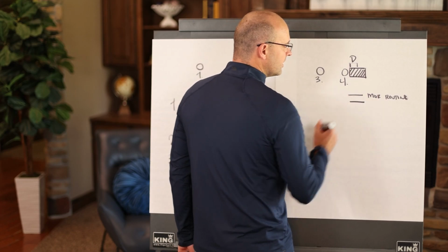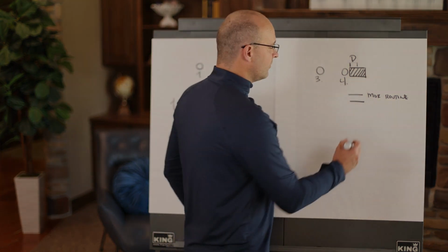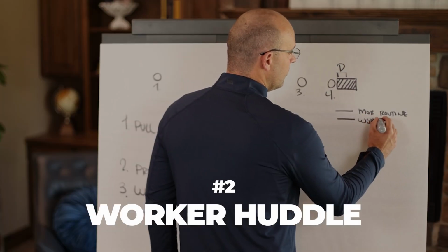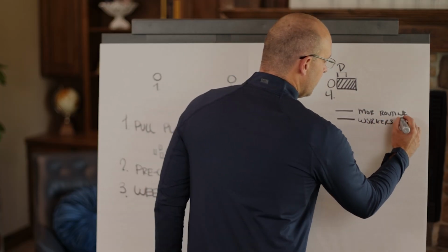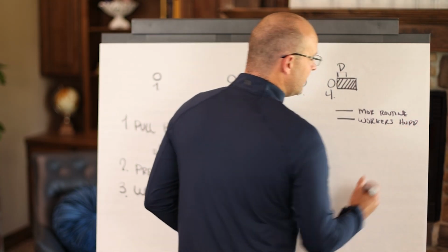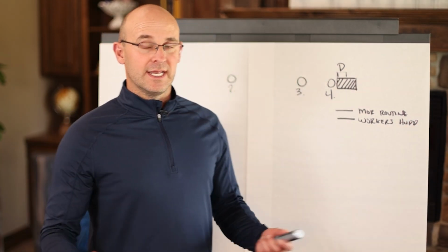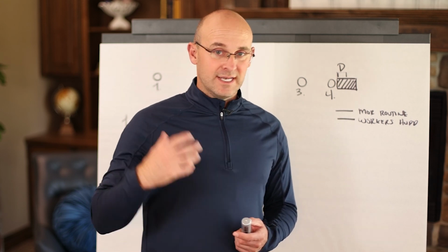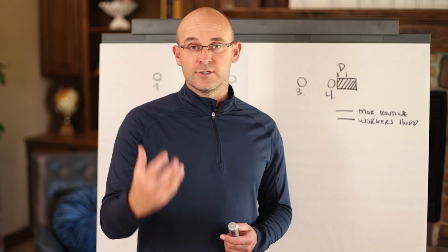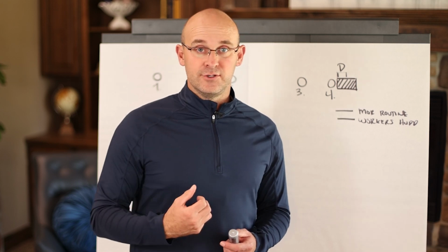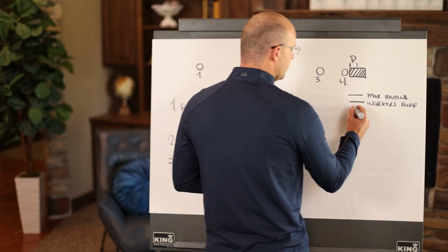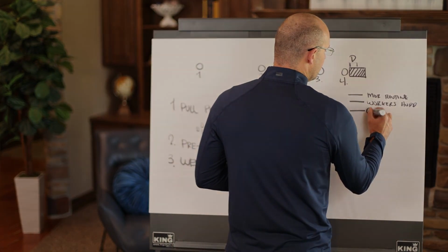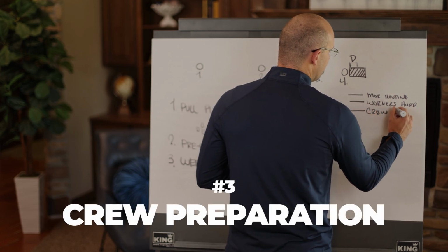So you do your morning routine and you plan your day. If the general contractor knows what they're doing, they're going to have a worker huddle. That's where all workers huddle at the beginning of the day, and the project team connects with them, garners feedback, provides the plan for the day, and creates one team, one social group, talk about safety, do a bit of training. After that worker huddle, you're going to do what's called the crew prep.